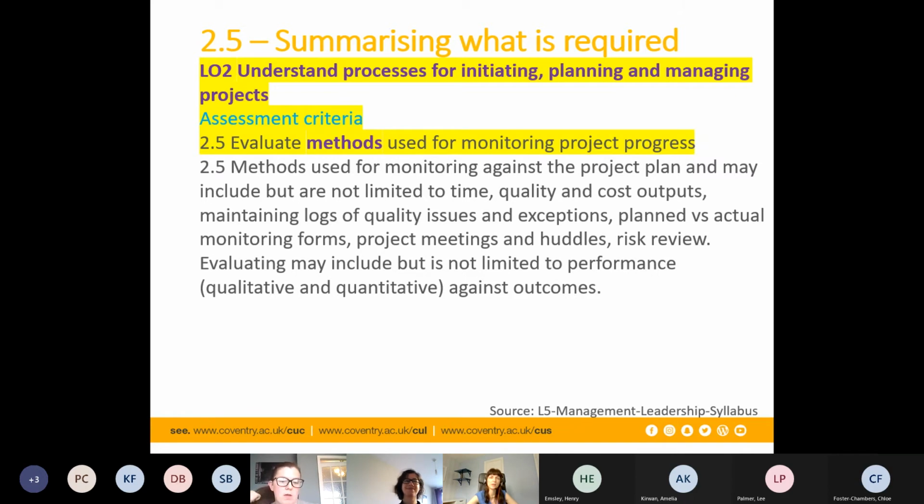I think we're very similar to Henry, so we use something called collaborative planning. We look at something called the plan percentage complete. We have the meeting on the Monday, we feed back to the planning team on the Tuesday if there are any major changes, and the planner will update the Gantt chart. Then we have to let the client know that we're running at a 75% PPC. And what does that mean? Plan percentage complete means we're delivering 75% of the work we said we would, instead of the 100.